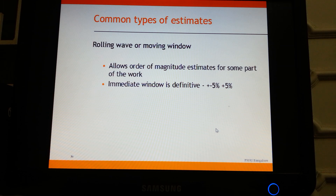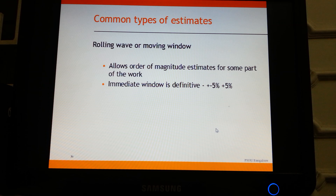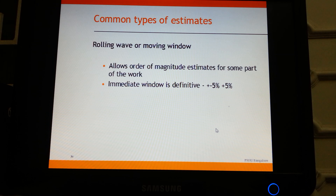When we get into rolling wave or moving window planning — where the project is running for a very long time, such as a couple of years — we may not do a fully blown end-to-end plan. We define milestones, and for the immediate window we decompose into activities with a definitive plan, whereas things falling far away may have only a budgetary estimate. Estimates and schedules can exist at various levels.